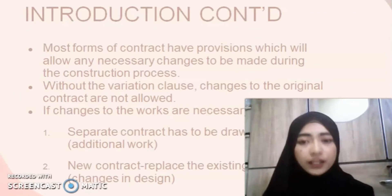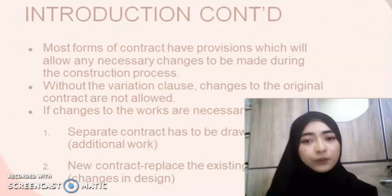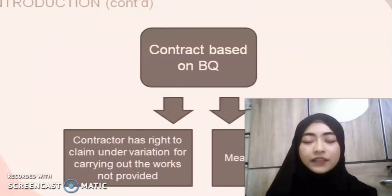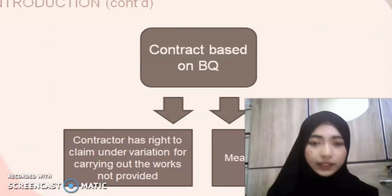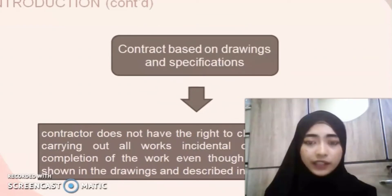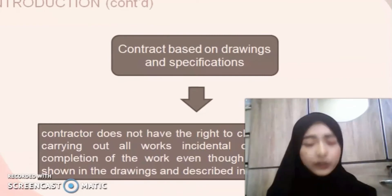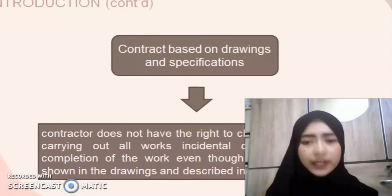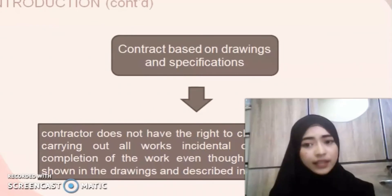Without the Variation clause, changes to the original contract are not allowed. If changes to the work are necessary, a separate contract has to be drawn up and a new contract will replace the existing contract. If the contract is based on the BQ, the contractor has the right to claim under Variation for carrying out all the works incidental or necessary for the completion of the work, even though those works are not shown in the drawings or described in the specifications.